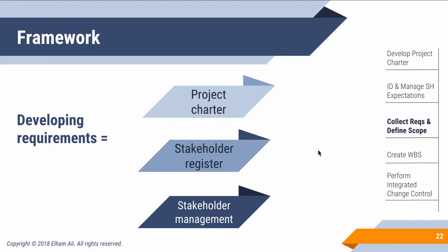is such an important role, because one of the common causes of scope creep is that stakeholders have been conditioned to expect added product functionality, and that they have no awareness that project work or cost is not their responsibility. So stakeholders do not necessarily understand how to balance the constraints of time, costs, even scope, quality, risk, and certain resources. And so we need to make sure that we have all these stakeholders on board from the initiation of the project, so we don't have those requirements slip and we don't have those change requests happen as early as possible. We want to control the requirements definition and development early on to avoid scope creep.